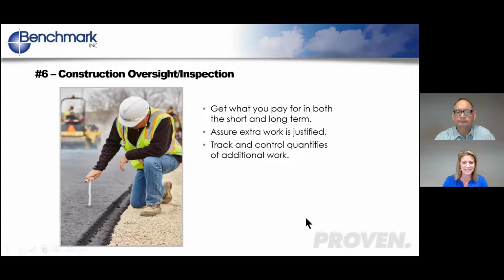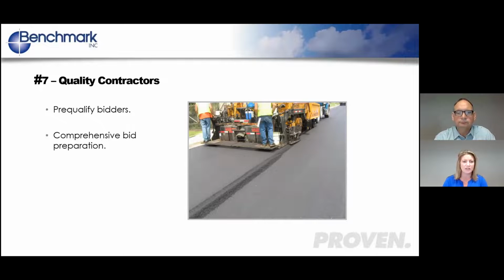And so one last step in helping to reduce the risk of change orders is quality contractors. When we talk about quality contractors, we think about the pre-qualification process. I'm sure everybody has a different way of pre-qualifying contractors. At Benchmark, we actually have a pre-qualification form that we send to contractors. It's about 3 pages. It helps us understand the capacity of that contractor, what type of work scope they typically do, and what work they would do in-house versus subcontracting out.